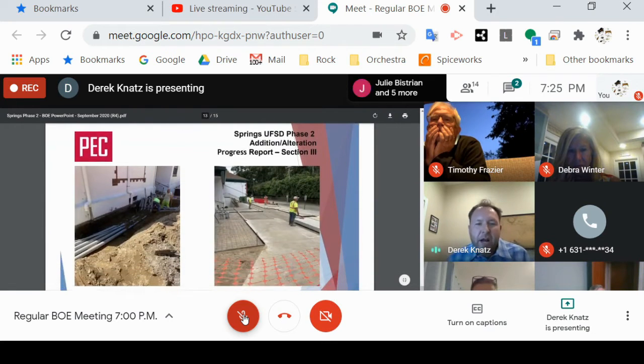This is the new conduit and transformer pad. To the left, you can see all the conduits. That goes to the new switch gear that will support both buildings. In the right photo, you can see the conduit stubbing through the slab. That's the same conduits that you see in the left photo. In the far right of that photo is the new transformer pad next to the gentleman in the green shirt. That concrete has since been poured back and is accessible. And again, we're hoping to have that all completed, ready for a switchover, and get both buildings on the new service over the Christmas holiday.